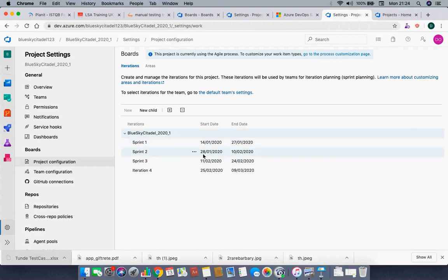And then also, as time goes on, it's possible that you've allocated 20 here and you didn't finish 20, you only finished like 18. And then the next one, you allocate 20 again, but you finish maybe 10. And another time, you allocate another 20, but you finish 17. So at the end, there's something they call velocity. You get the average of the points that you've done in the sprint. So that will be your velocity.